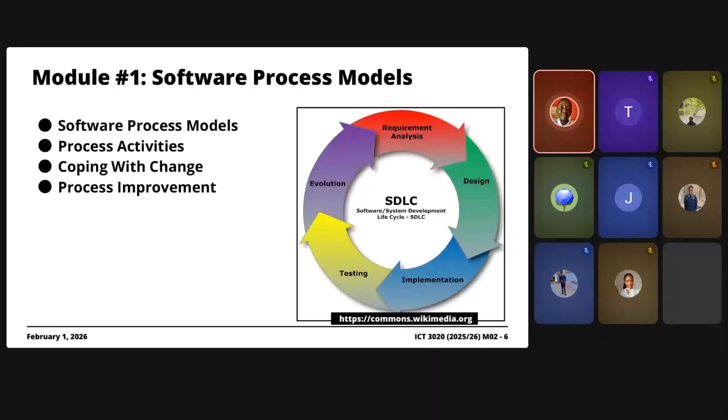There are other approaches on how you can sort this out. It's a serious problem, by the way. Your question is also tied to a concept called scope creep, where things will be introduced as you are writing the software, and new changes are being integrated. What you can do is use a software process model that allows you to incrementally or iteratively deliver value to the client. So as you're delivering value, let's say this week, we're going to deliver